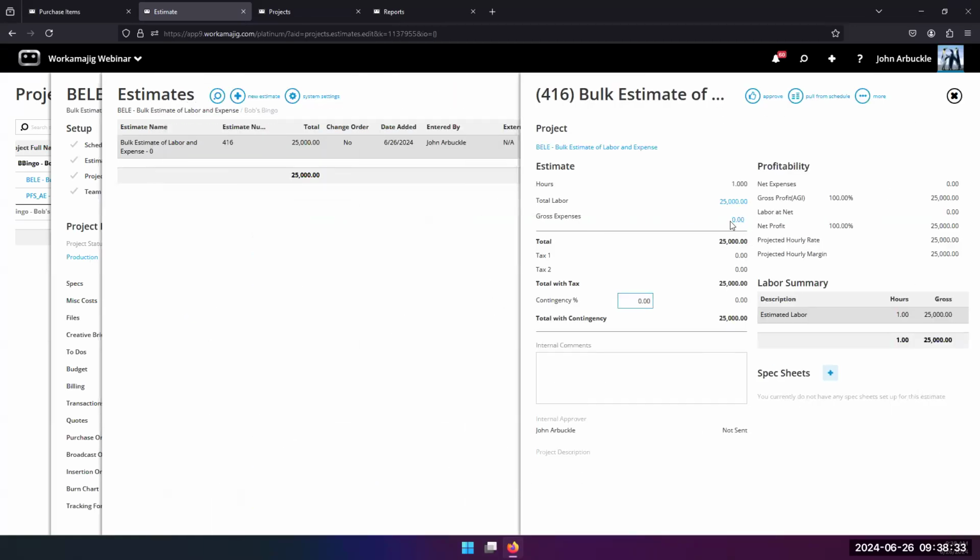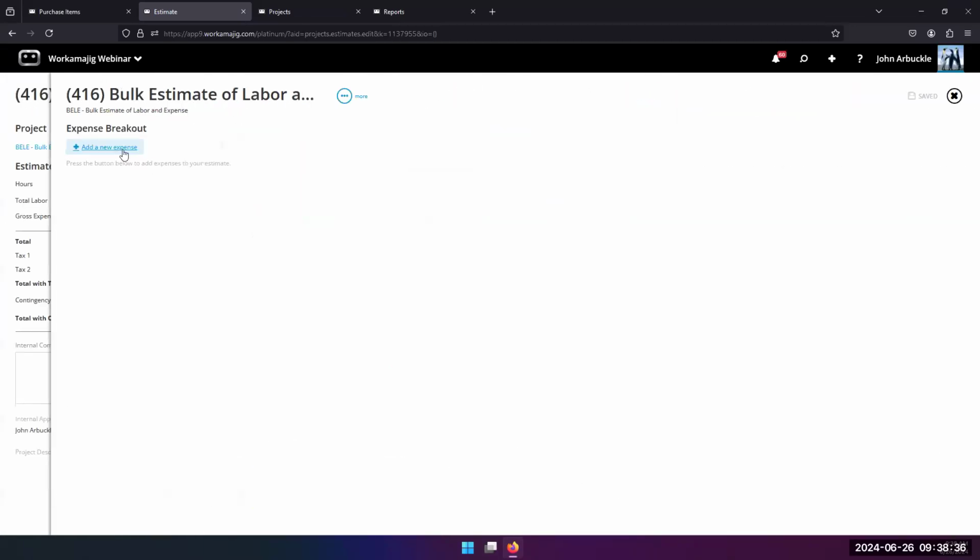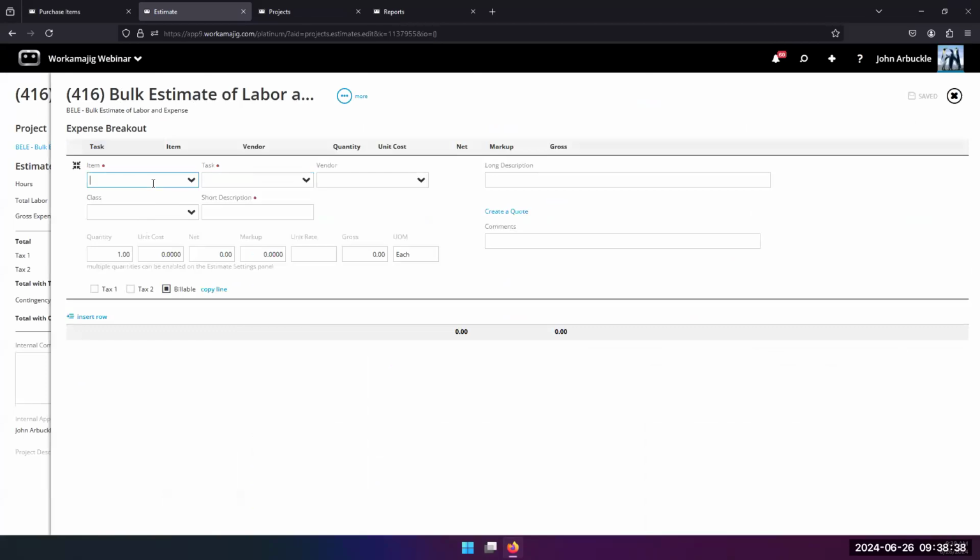And then when I go to my expenses, I'm going to do that same thing. Add an expense. The item is going to be that budget, right? There's my budget estimated expense. And I go ahead and put in, again, that bulk number. Maybe I'll just put in the net, expecting about 150,000. And this works on markup. As opposed to that, if you're talking about media, then I'll just put in the gross, and let's say that's supposed to be 200,000. Okay.